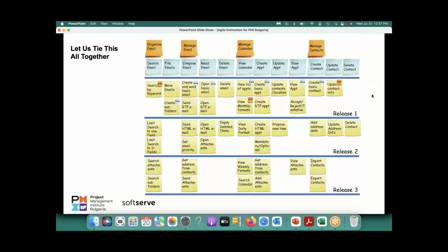People are using it. Another thing, how much control a stakeholder and CFO can have. They can come back to you at the end of the 4th month. If you are doing monthly releases, come back at the end of the 4th month and look at this. You might have done 35, and they say, we don't need the rest. We can stop this.